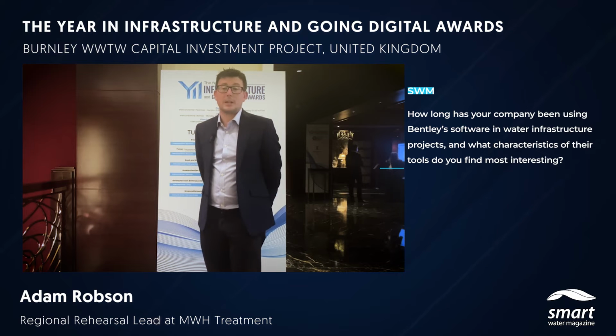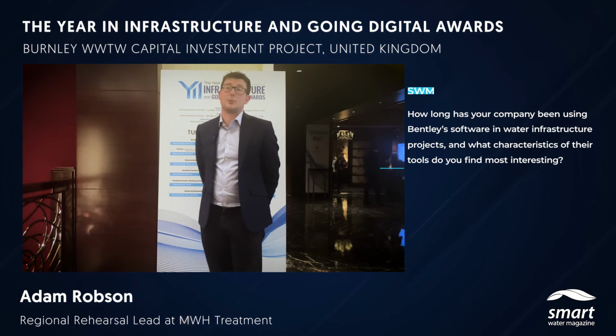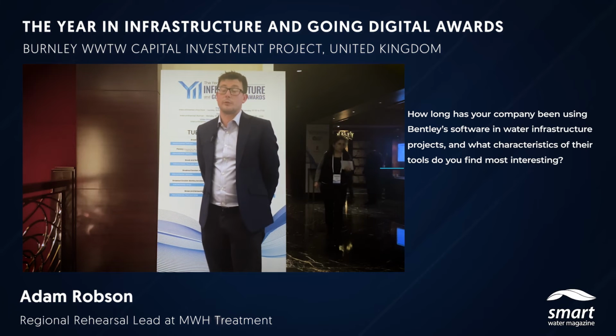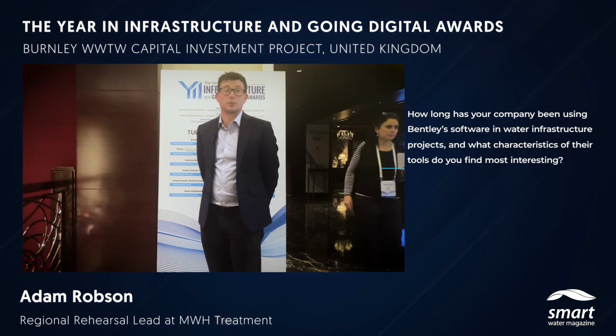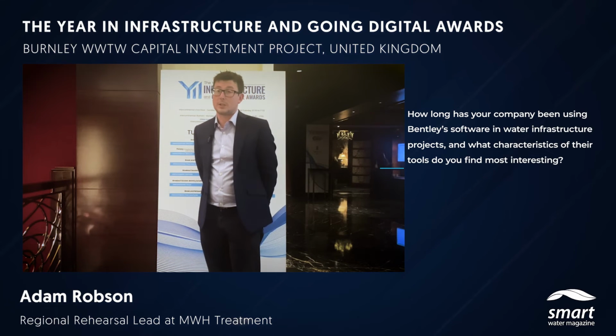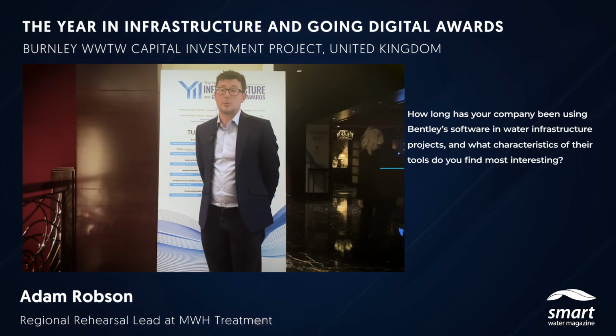So the Bentley software we've been using is Synchro 4D. Synchro 4D takes the 3D model and we link it to the construction schedule or construction program, producing what's known as a 4D model, and then we use it for digital rehearsals. So we've been using those digital rehearsals with the project team to hopefully make the program as efficient and as lean as possible, and ensure that we are going to deliver the project in time.